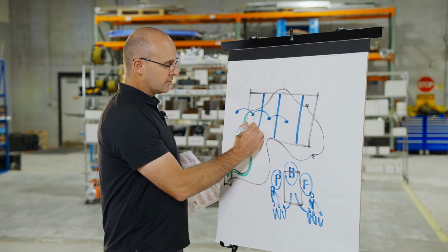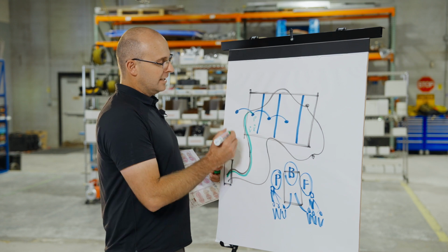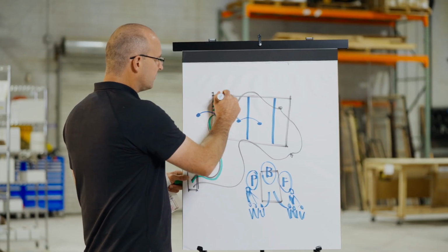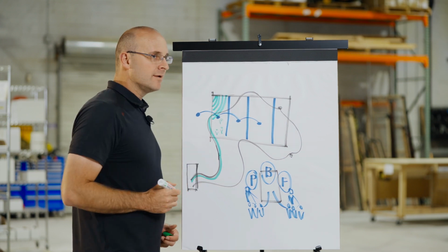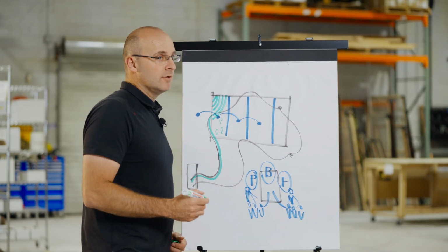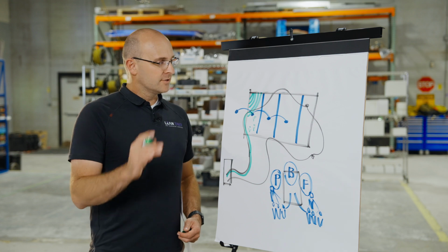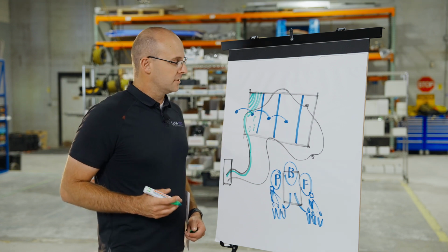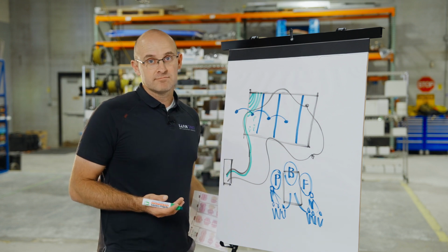And their workers are working around the area, right? And you say, hey, can I have 5 minutes of your time? All of this area over here that you've already done, can we walk it and punch it as we go? Finish it as we go. And if there's any issues, just flag it right there with the foreman, with the crew leader, and the crew can fix it right there.